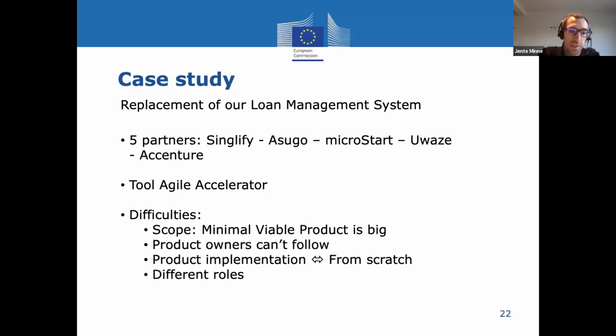Agile, normally the pre-project analysis is not very much, but you do your analysis over the whole project. So you will analyze less upfront, but we have the feeling that now the developers are developing very fast, and that we as product owners cannot follow anymore. If you always need to talk with different stakeholders, with your clients, with your end users, and some of them are only 1 or 2 persons, they're on holidays or other, it's difficult to get feedback, then it's complicated. So this pre-project analysis, if you don't do it enough, can be complicated.